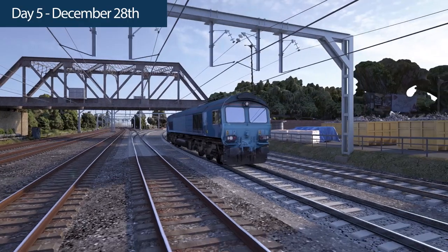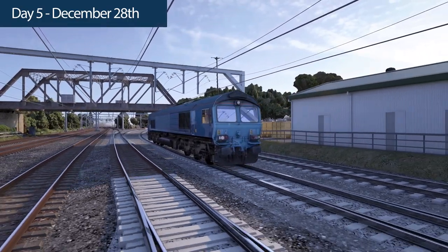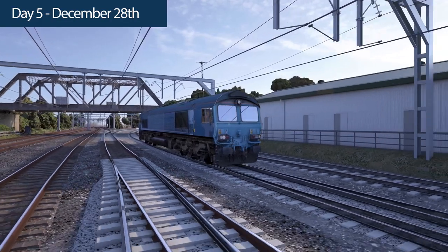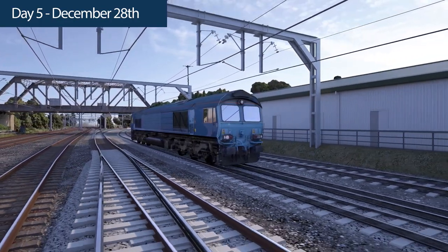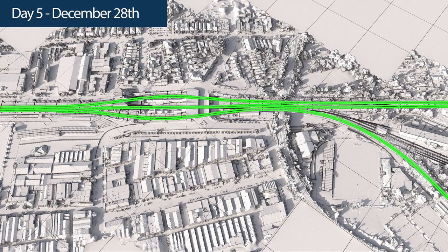Signalling DIT testing will continue in the early hours of the morning, which will involve simulated train testing on the mains with diesel locomotives. This is the final activity before booking the signalling back into service. Whilst all plant is fully operational on the Illawarra locals and Bankstown lines, SMU's worksite protection team will be preparing to hand back the shutdown of the Illawarra main lines.